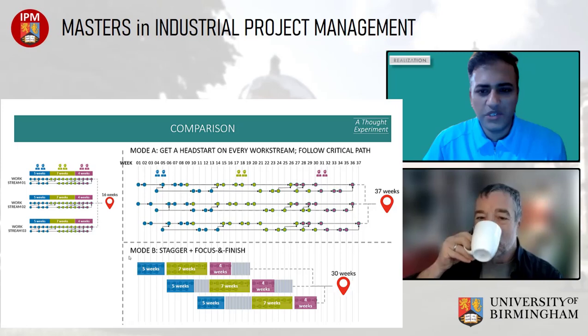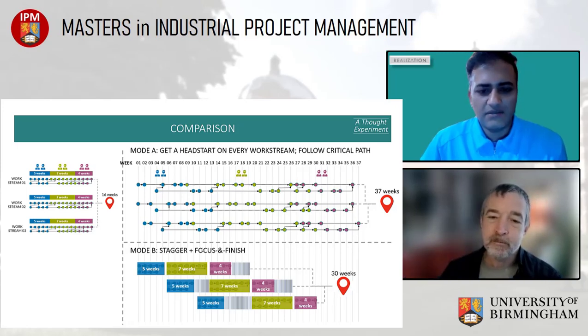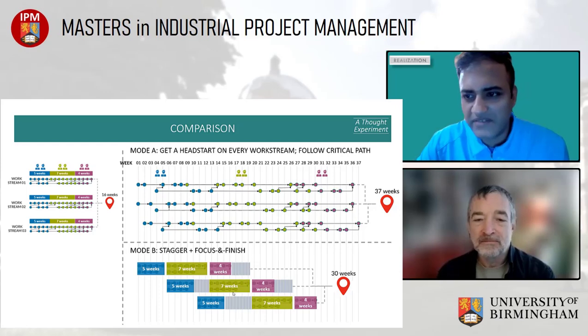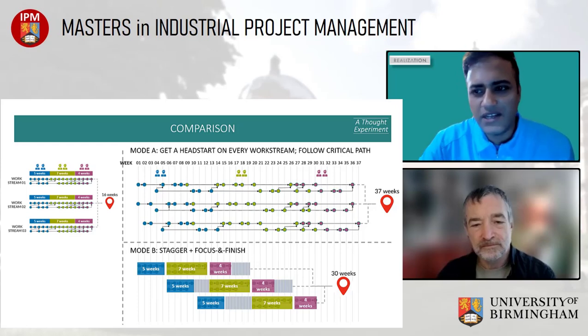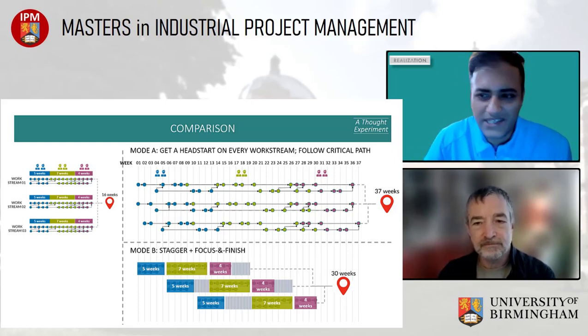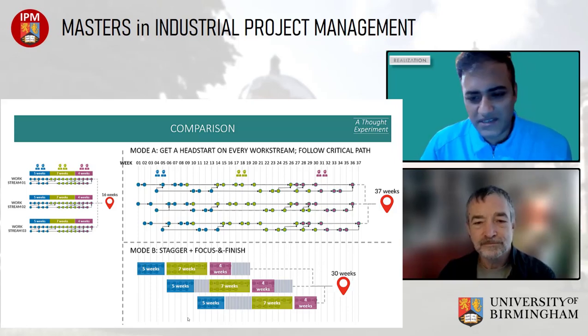Now, if we have to use software to do this, we cannot use the traditional tools, because why? Because in this picture, the boxes need to be identified, the batches need to be identified. But in reality, work will actually get executed in the dots. People can only identify dots. An engineer needs to know the name of the drawing. It doesn't care what the batch says. It still needs to identify which drawing has to be done. So the work will still happen in dots.